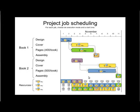On the seventh of November the other worker becomes available but is immediately needed to assemble Book One. Once he's free again he starts the cover for Book Two, and the assembly for Book Two happens on day eleven. So after eleven days Book Two is done — quite a bit longer due to our constrained resources.